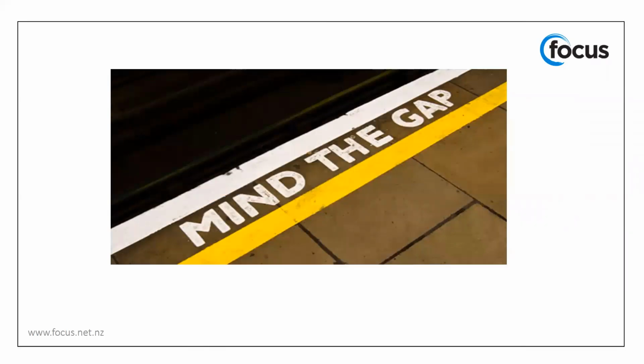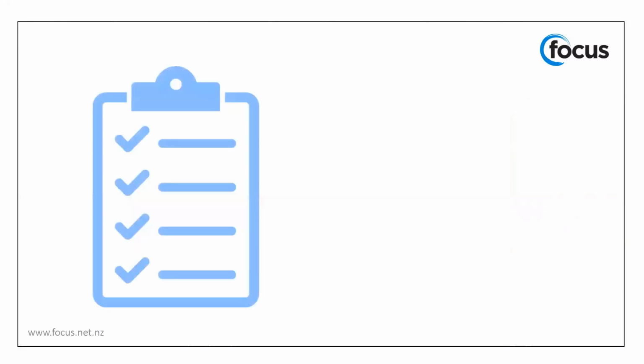Indeed. So with the questionnaire, the process mapping and the gap analysis complete, would you now be ready to start your implementation? So the object of what we're working towards is to define what the implementation consists of. It's easy to say, and we often hear, I want the software installed, but it's important to be clear on exactly what that means. So all this work that has been done up until now leads us to the scope document, which is a document that outlines what is going to be done in the project.